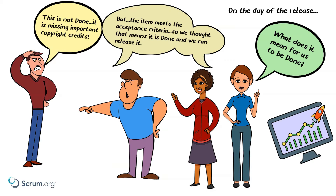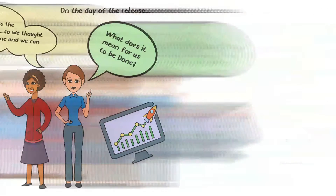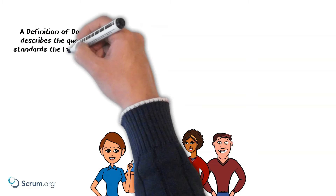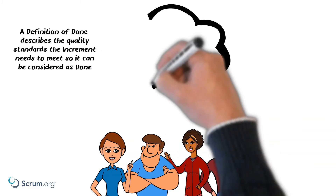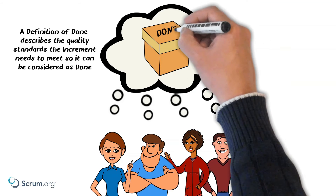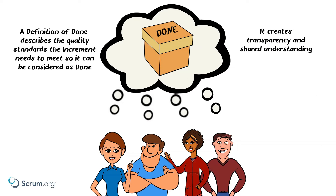Robin explains that the definition of done exists to avoid the situation the team is in from happening. It describes the quality standards the increment needs to meet for it to be considered done. This creates transparency — a real shared understanding of what it means to be done. Everyone in the team agrees that establishing a definition of done is a must, and Robin volunteers to facilitate.